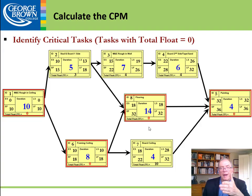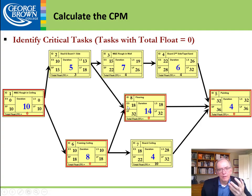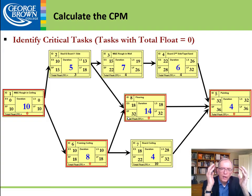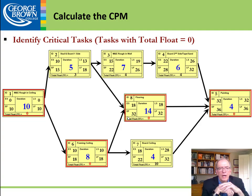That is in a nutshell how we do the forward pass, the backward pass, and how we calculate the critical path. Scheduling software uses this same simple algorithm of adding and subtracting. Developing a schedule really helps you visualize step by step how the project is going to be built — it forces you to have a vision and break the project down into components, connecting chapter 2's work breakdown structure and chapter 1's goal setting to the technical requirements.